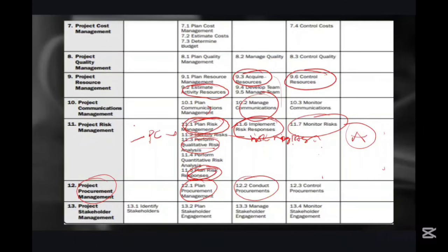So you need to take quotations. This guy says, I'll charge £5,000. This guy says £2,000, 7,000. So we need to check the £2,000. Do you think they can do the job? We check their reviews on Instagram, their social media handles, or talk to other people, go to their website, check their level of experience. So we need to understand these ones and manage and conduct a procurement.